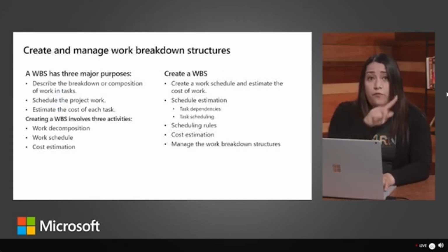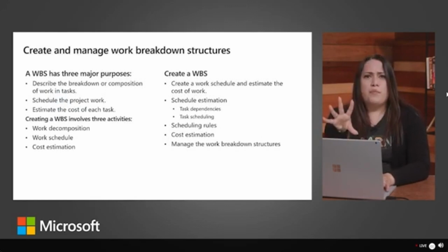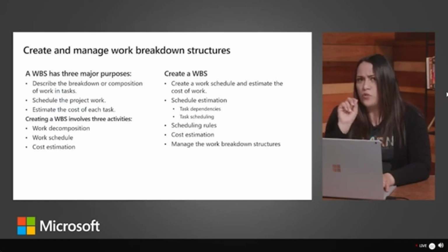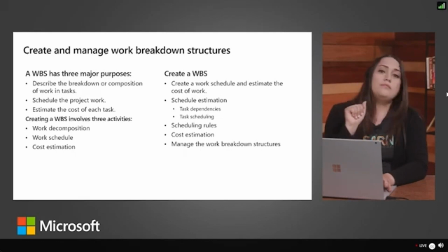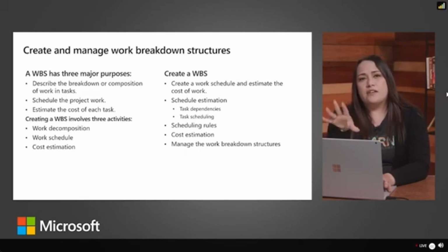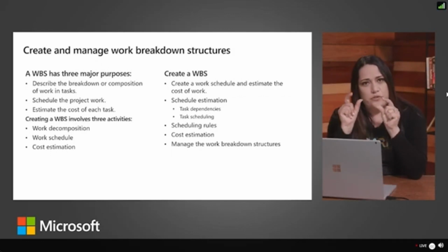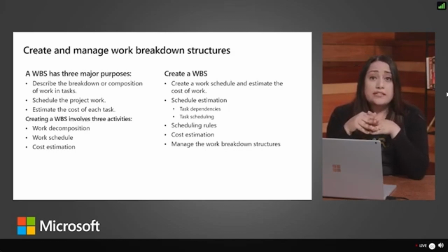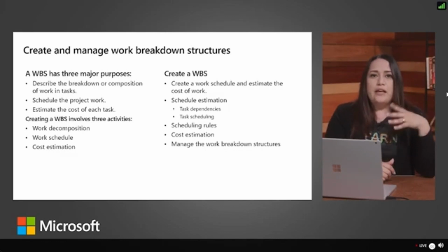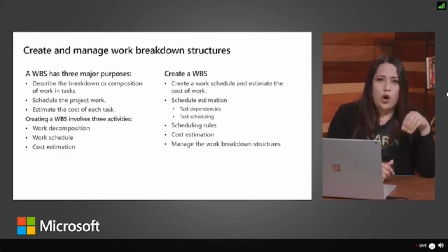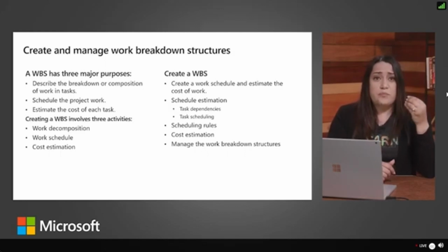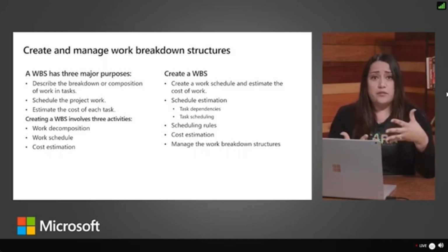Now, for this next kind of session in Module 6, I do want to explore the tools that can specifically assist with the execution phase of the project. When you get to that phase, oftentimes project managers are going to break down that project into mini milestones. We have a tool inside of Dynamics called the Work Breakdown Structure, or WBS. This is a tool that integrates the scope, the cost, and the schedule baselines, and it ensures that the project plans are all in alignment.